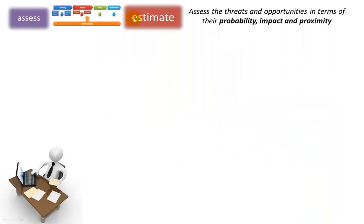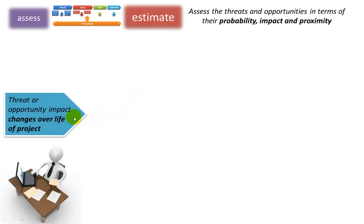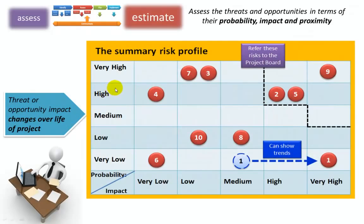The next step is assess, which has two sub-steps. The first is estimate: to assess the threats and opportunities in terms of their probability, impact and proximity. The threat or opportunity impact changes over the life of the project, either due to internal or external situations. One way to plot how serious each risk is uses a summary risk profile — a simple matrix of probability from very high to very low against impact very low to very high, where each red button represents a particular risk number. You can set where risk tolerance is, and any risks outside that need to be escalated or dealt with — the idea being to get these back closer to the origin. This can accompany highlight reports to the project board to show trends.